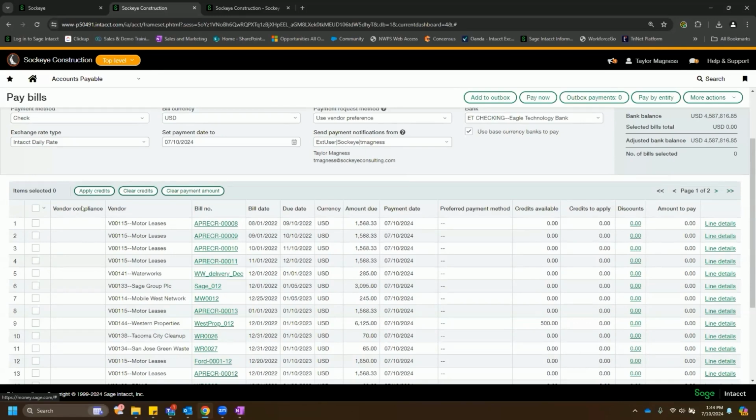But once we have set up those documents that we want the system to be looking for, we can then configure it very similar to that spend insight to essentially just warn or completely disallow payment to that vendor or subcontractor until someone has gone in and put that document into a compliant state. And so if we were to run into issues, we would have a hyperlink get thrown here that we could dig into and look at which document it is that's out of compliance.